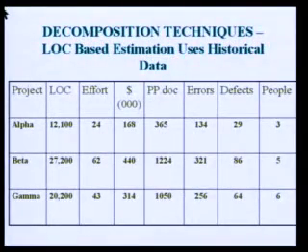So now let us go to the final historical project, that is Gamma. Please have a look at the slide. The number of lines of code is 20,200. Effort is 43. So here the lines of code is 20,200. The effort is 43 person months. So one person worked on this project for 43 months. Then immediately you may say how many people are employed, that is 6. So approximately it must have taken a bit more than 7 months for them to complete the project.